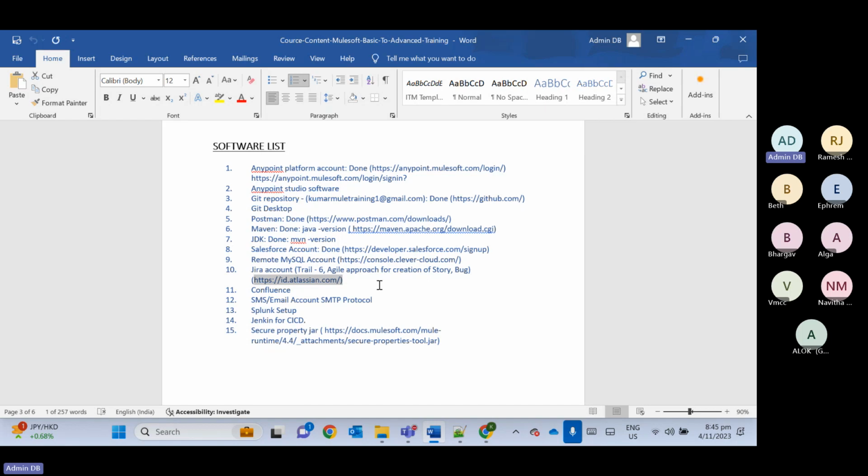Now, the Scrum Master will see what is the capacity of the API team. He found the capacity of the API team is 35 story points. They can deliver only 35 story points. So based on the priority, the Scrum Master will take tasks within the 35 story points, and the 5 story points of tasks left will move to the next sprint.